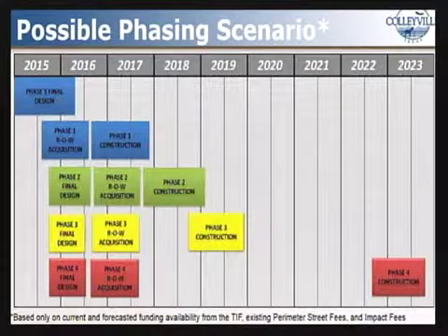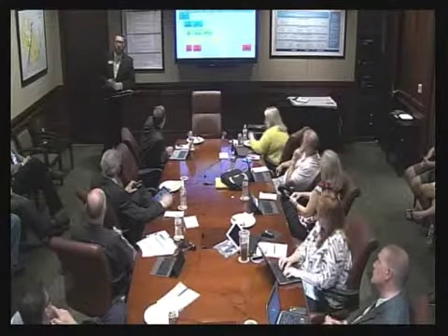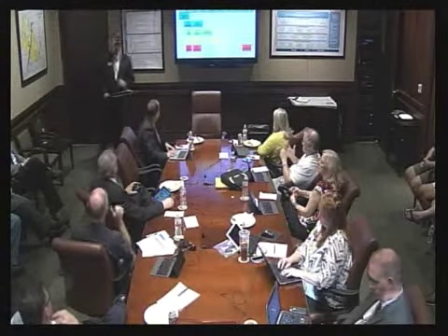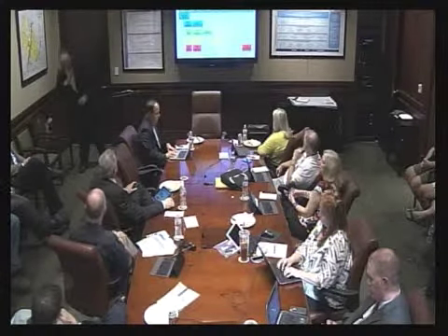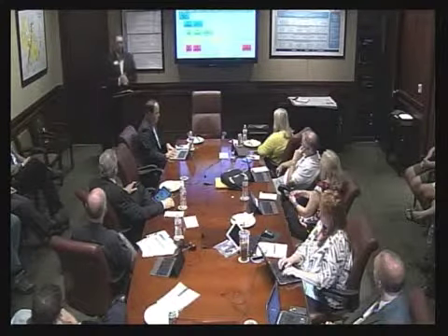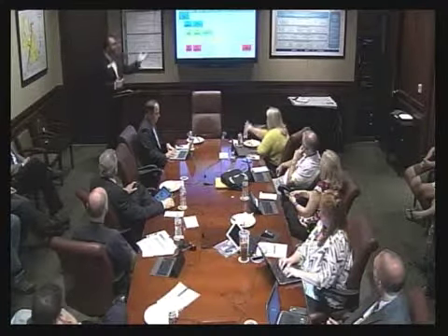And Jeremy, some of this was because we want to pay cash for this. Correct. And when we amended the current TIF district to add in Glade Road, that was based on concerted cash projections, that we would have the cash coming into the TIF to meet this. So, correct. This is completely based on available or forecasted funding amounts. There would be no debt issued with this particular phasing scenario.